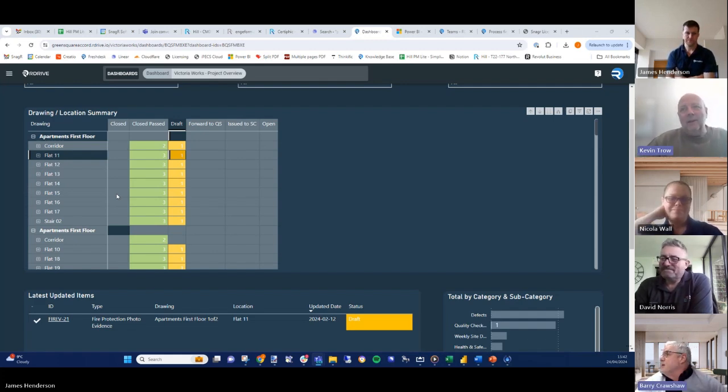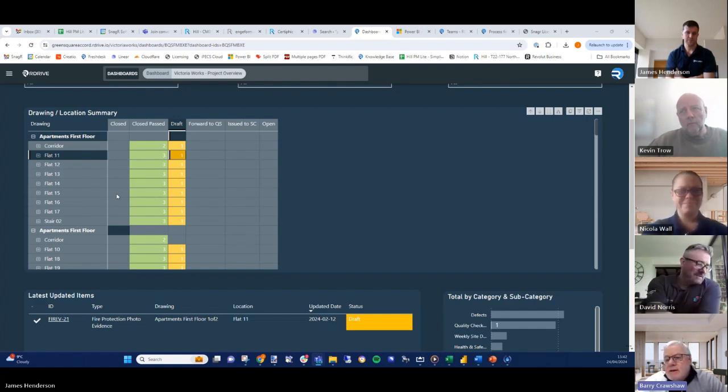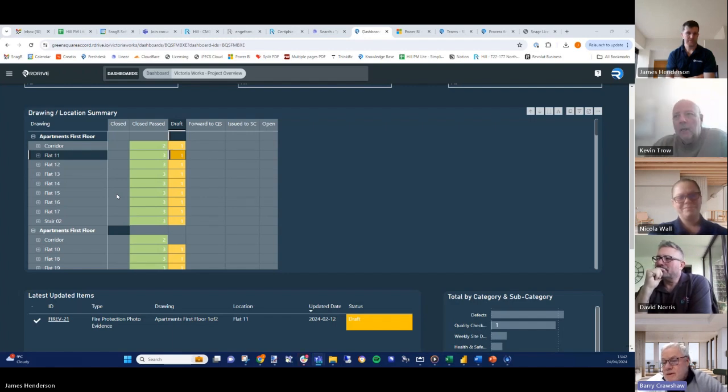I'm not telling you how to run your business, but you've got big brother and little brother and gentle brother. But someone like, I won't mention names, some of our other partners, it's in the commercials, and it's like, you are not responding to snags. Therefore, when you put your invoice in, I ain't paying you. And when you start fixing the snags and the defects I've sent you, I'll start paying your bill. You get into conversations like that. I'm not telling you how to run that business, but that's how they make them clear their defects down.